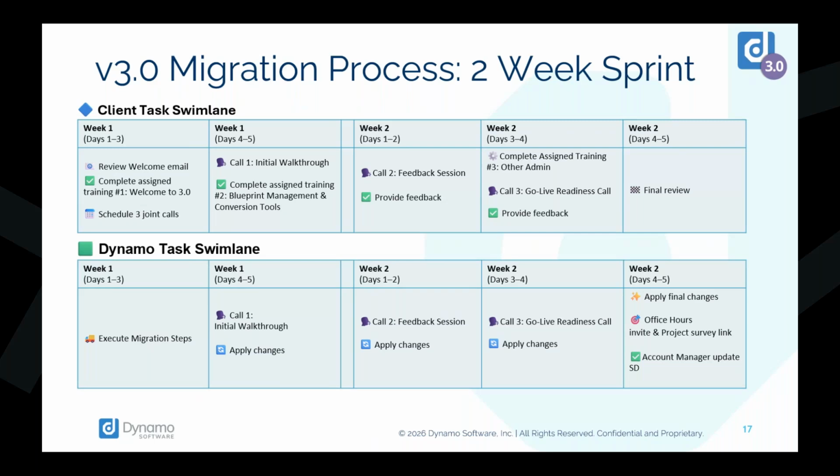There's clear time-bound deliverables on the client side leading up to go live, which include completing several key online trainings such as Welcome to 3.0, Blueprint Management and Conversion Tools, as well as admin training. And we also request our clients are actively participating in 3 joint working sessions over that 2-week period, making sure that they're providing timely feedback to ensure configurations are refined quickly and progress stays on track.